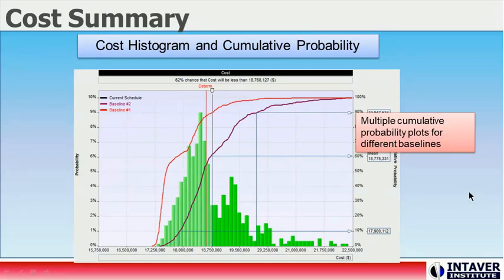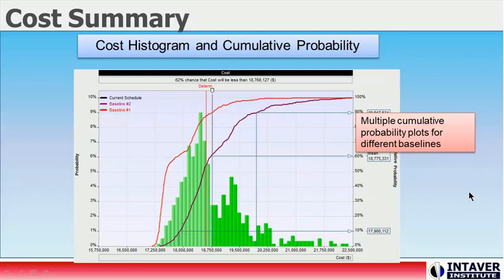After running a Monte Carlo simulation, two of the most popular reports are histograms and cumulative probability. In this particular example, we have a combined histogram and cumulative probability chart. On the left y-axis is the probability — we can see the most likely value occurs 9% of the time. On the right y-axis is the cumulative probability values, with markers placed at the 10th percentile, mean, and 90th percentile.